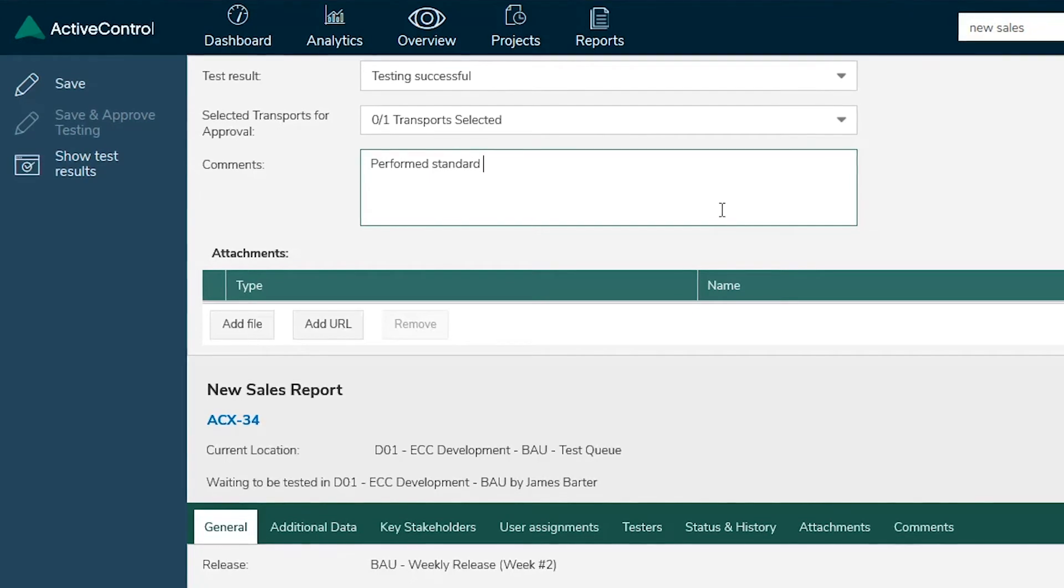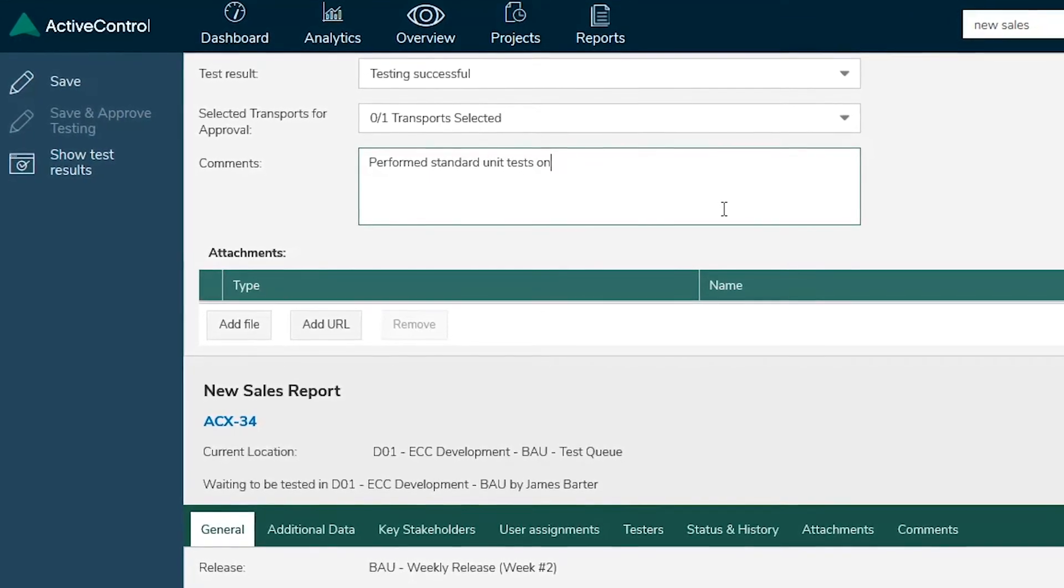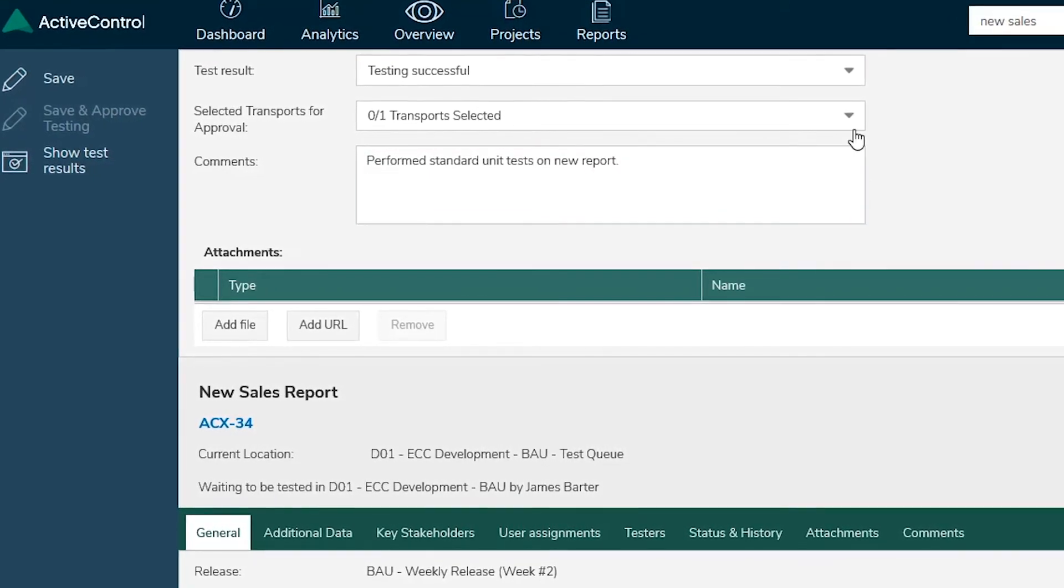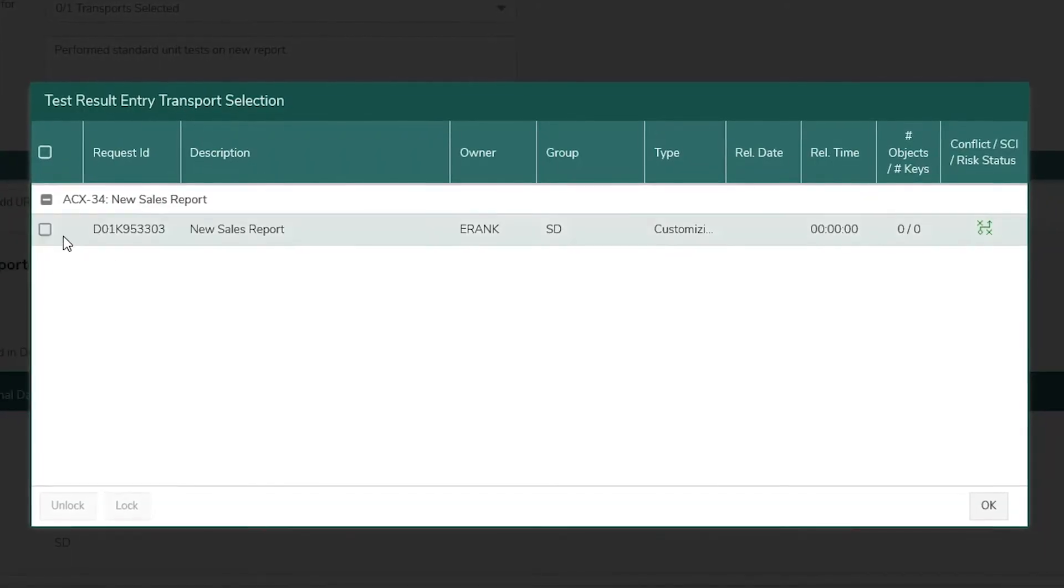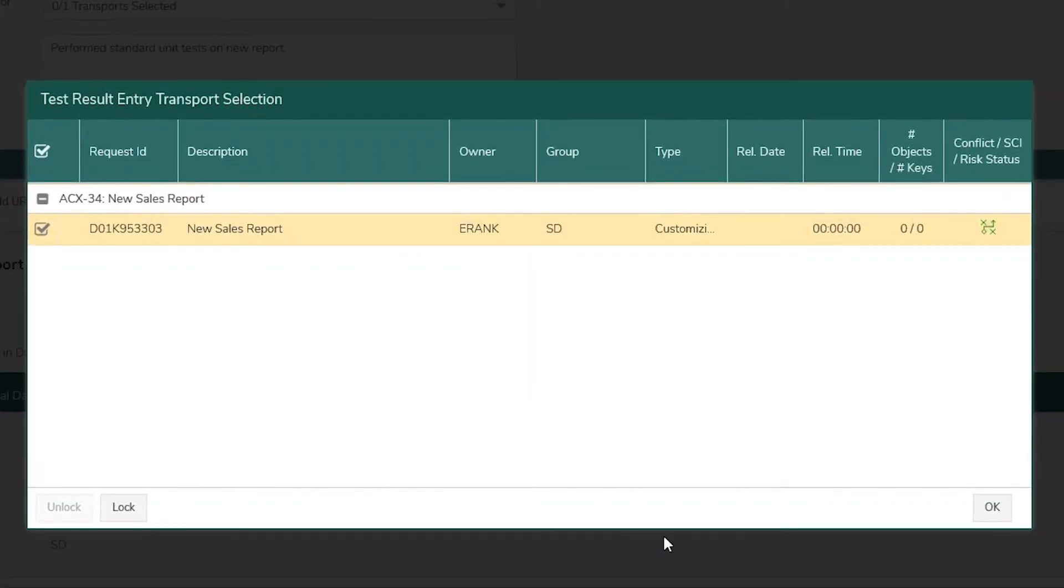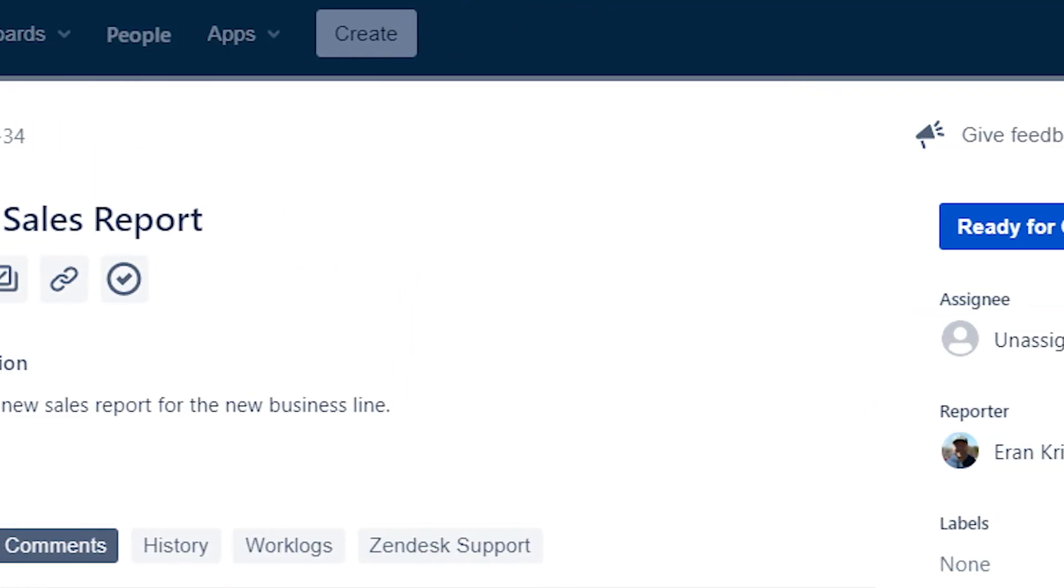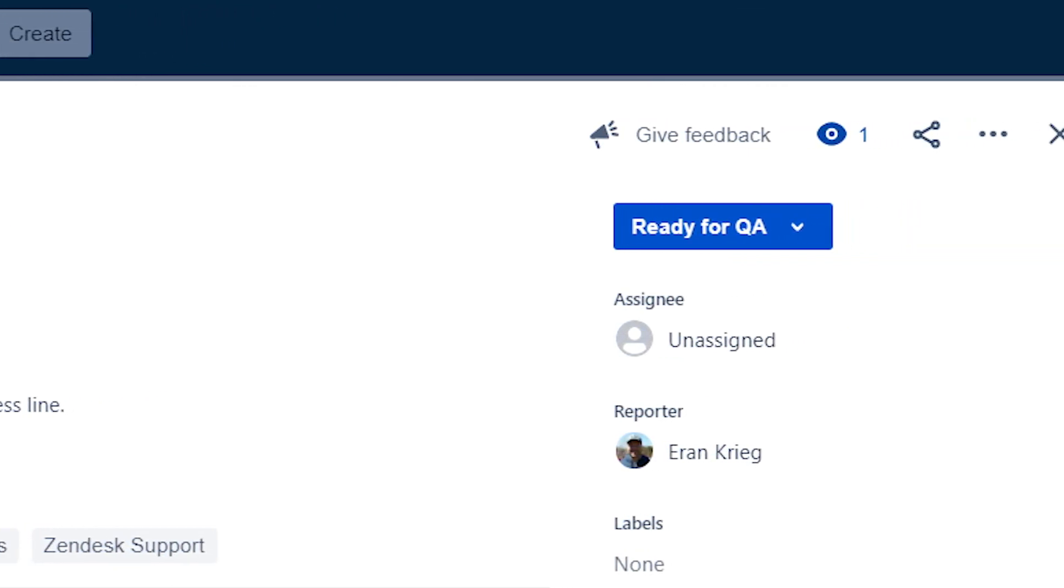Unit testing is successful. Having met technical rigor and criteria, ActiveControl automatically imports this change into the QA SAP system. The status of the JIRA user story is updated automatically.